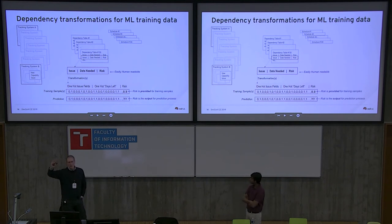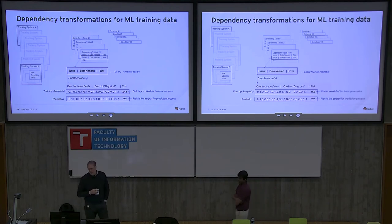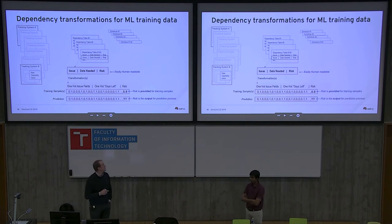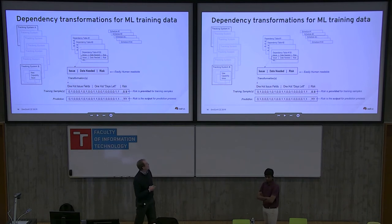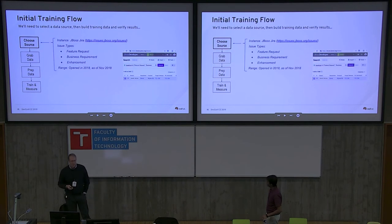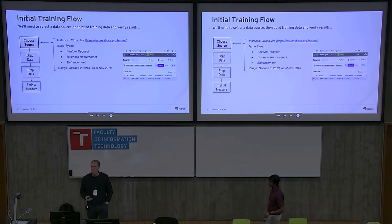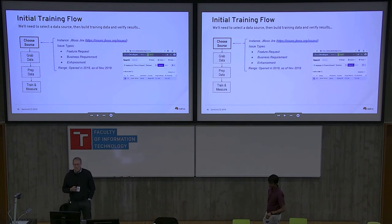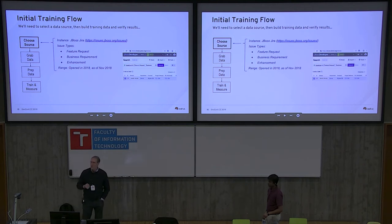If you remember the picture with the fairly complex problem domain, let's zoom in on one of the dependencies in one of the tables associated with one of the schedules. That had a pointer to the issue, a target date for when we need this thing to be ready, and what we want is the risk. We need to create training samples and provide a value for risk to check the training. The first data source we choose is the JBoss Jira instance. This has been in production at Red Hat for over 10 years for both community and product, and has hundreds of thousands of issues. We're talking about new capabilities — not bugs, not tasks — things like a new API or a new protocol that your product may want to leverage. In Jira the rough mapping of new capabilities to issue types would be feature requests, business requirements, and enhancements.